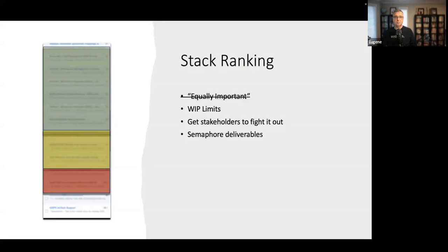And what this allows the PMs to do is to say, that red one, we actually really need that within the next 3 months. So then I say, okay, great. Tell me which one you want to take out from the list above it, right? Which one you want to prioritize. Reprioritize it, and that red one will move into yellow or maybe into green, right? So that's a really good way to communicate as a team what you're planning to deliver and your confidence level on being able to deliver it.